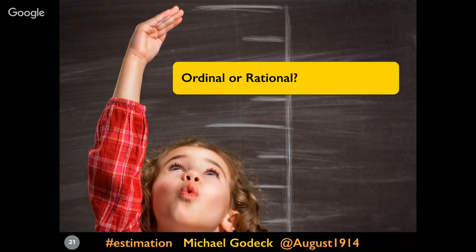But remember first that our goal is just to sort the work into manageable chunks for prioritization and keep the focus on the business value and avoid solutioning. So we don't have unlimited time for the process, and we want all the team members to have a similar understanding of the scale. And so there's a simple ordinal scale that was proposed by Alistair Cockburn, right? That for me really clarifies what an ordinal scale is about, and I find it really effective in this backlog refinement context. And his scale has the set members Cherry Pit, Peach Cobbler, Mustang, and Brontosaurus.